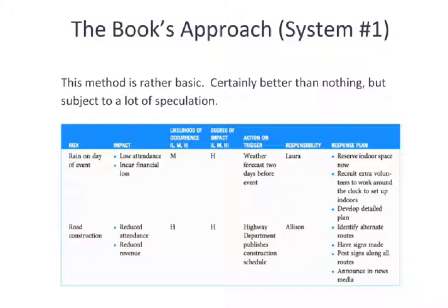Typically, the forecasts are reasonably accurate for a 48-hour duration. So they've decided that is a good time to look, and it still allows them 2 days, 48 hours, which they believe to be sufficient to make the move. That's the other part of this you have to keep in mind. If you wait too long to make the decision, you may not be able to respond due to the amount of work necessary.